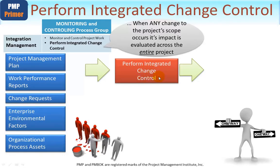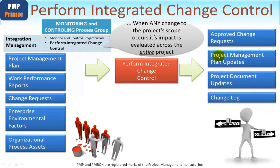Let's look at the outputs. Once a change has been considered across the whole of the project, it is from this process where approved change requests emanate. Once these have been approved, they would then be fed back into Direct and Manage Project Work, where the changes are actually implemented.